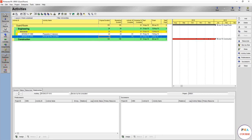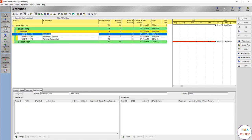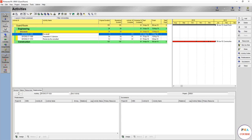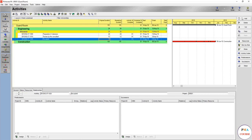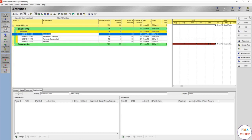Then you are going to add one more activity, which is resubmit. This activity might happen and it might not happen, but whenever it's not happening you will close it while you are doing the update. But you should add it because you might need it - you might get a Code C, for example. Then we will have the last one: approval by the consultant.